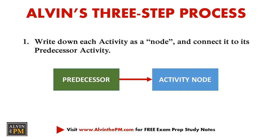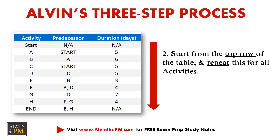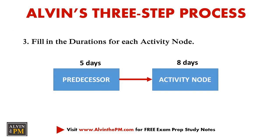The first step that I follow is to write down each activity as a node or a box, as shown on the slide, and connect it to its predecessor activity — in other words, what activity occurs before it. I then repeat this for all the other activities shown in the table. And lastly, for step three, I fill in the durations for each activity node.